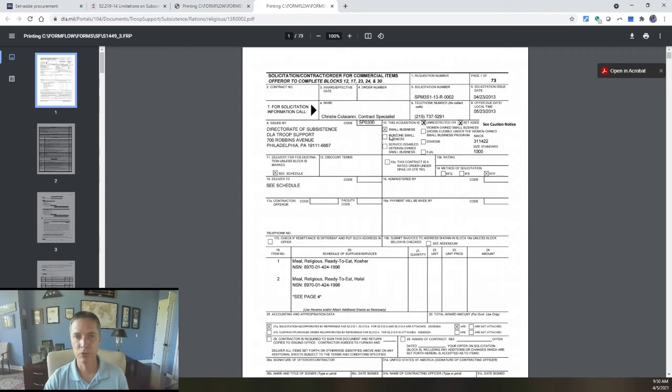If you have HUBZone checked, then that means the contract that you were awarded was awarded to you because it was competed or it was sole sourced to you as a HUBZone company. So only HUBZone companies can satisfy that 50% of that contract work. So you as a HUBZone can do 35% of the work, and you can subcontract to another HUBZone certified company that can do 15% of the work, or 16%, right? So a little bit more than 50% just to be safe.